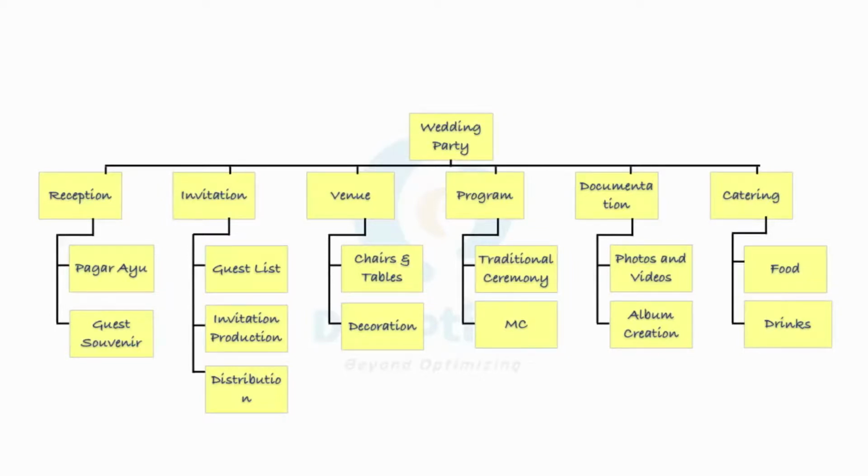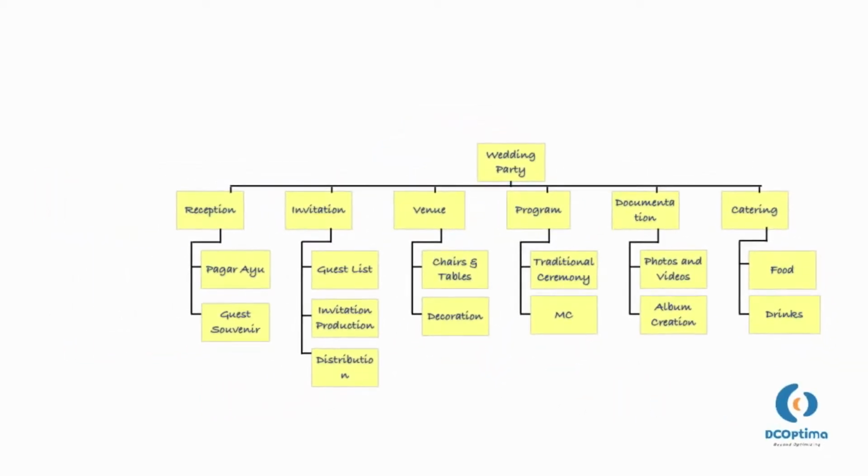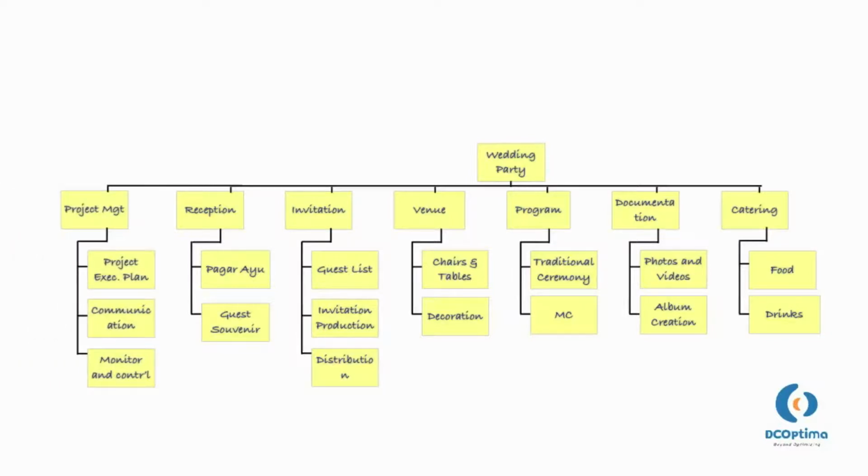Wait a minute. We miss one important major deliverable, project management. Project management elements have to exist in every WBS. It represents the work to be done in managing all the processes of other elements in the project's WBS.